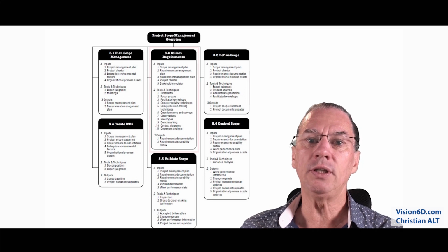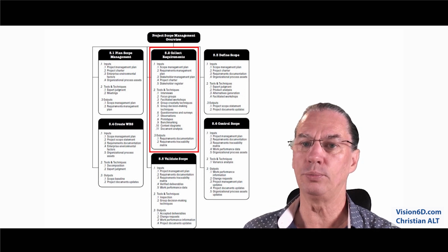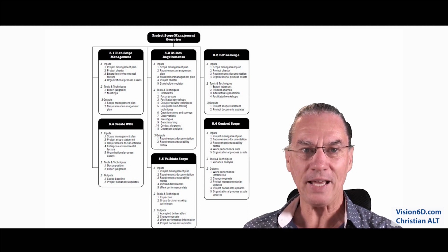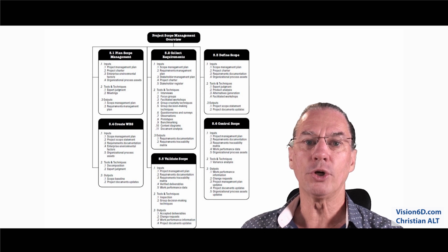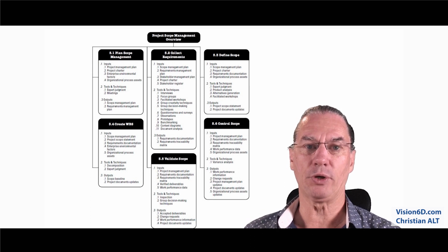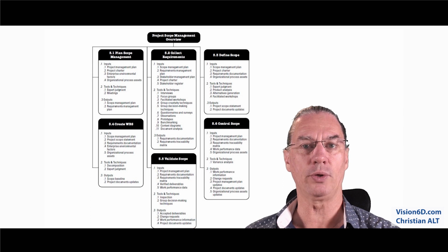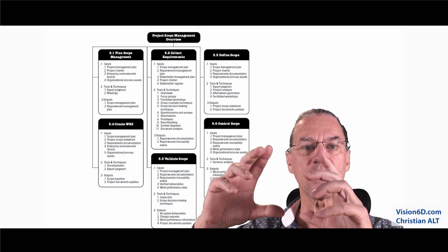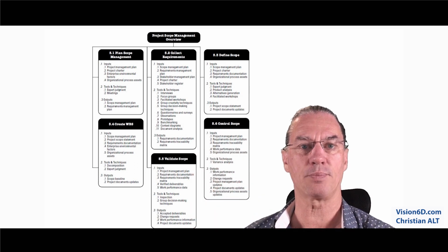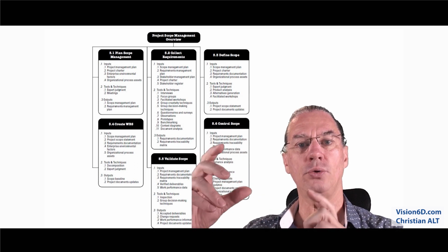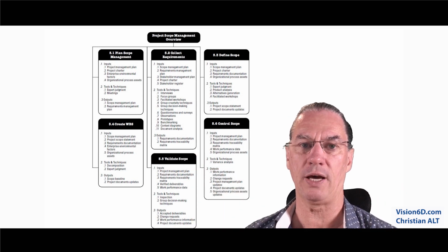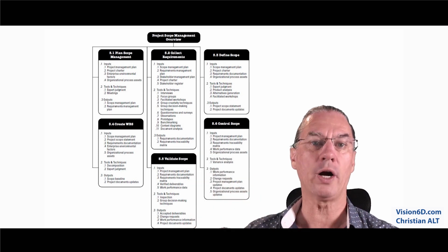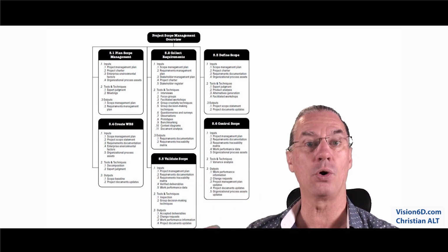So what do we need in order to be able to do the WBS? Most of the time, you will need the requirements. And is it really working like that? With my experience, what I see is that you are doing the requirements, but to do the requirements, you already need in some way to decompose your complex project. So you are already doing some part of WBS. So you will see that more or less requirements and WBS go and work together.